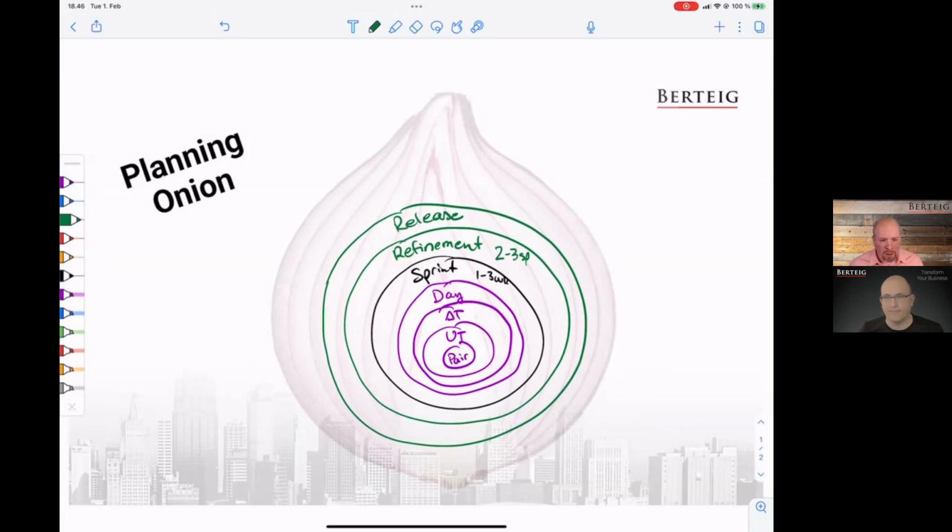Now, in agile environments, most of these major releases tend to be between 2 to 6 months. Anything longer than 6 months seems like a very long time. If it's less than 2 months, it often feels that there's nothing wrong with that, but it's just small. It's not a thing that makes a big splash most of the time. It might, for some individual features, but usually I can see people do it. So 2 to 3 months forward, that's certainly the level where we involve the stakeholders quite a lot, because they need to know. Those are the moments where they get the release. It's going to make a big difference to them.